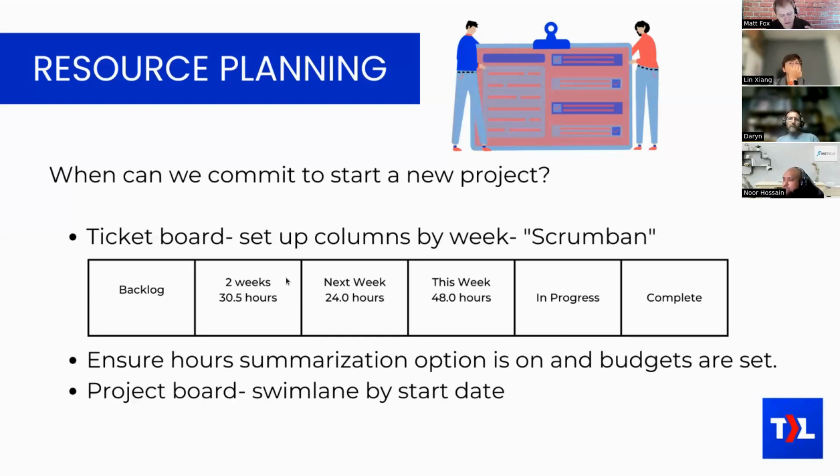And Topleft does offer a way to indicate predecessors on the Kanban board. If you have gone out of your way to set up the predecessors on those tickets in ConnectWise, or Autotask supports it as well, then I'm trying to remember how it works here. If the ticket has a predecessor, you can make it display that on the card, and then if you hover over that area on a card, it'll say the ticket number that is the predecessor of that ticket. And if that ticket appears on the board, when you hover over that area on the one card, it highlights the other card for you. So it makes it really easy to identify where that ticket predecessor is on the board if it has one. So that's how it works on the Kanban board.